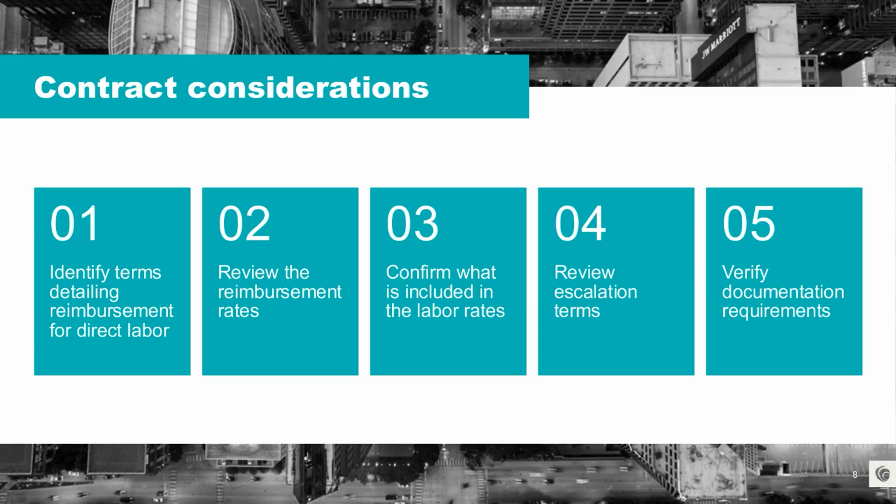Review escalation terms. This is another important term that oftentimes goes overlooked. Construction projects can oftentimes span months and years, so escalation clauses should be common. And I say should because many times in our audits, this key term is either left out of the contract or it's vaguely defined. So review how and when labor rates can increase, whether tied to union agreements, inflation indices, or annual adjustments, and ensure escalation triggers are clearly defined along with the documentation requirements to prevent unexpected cost spikes.